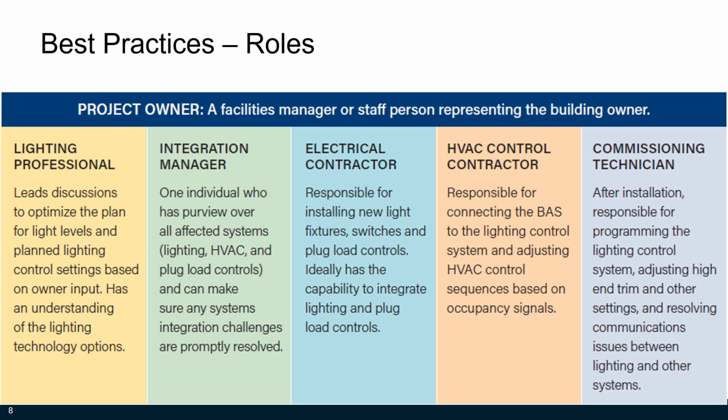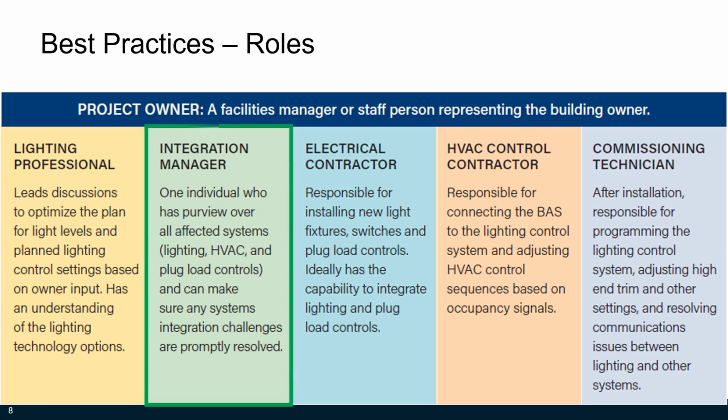This figure describes team members' roles that are necessary for successful implementation. One individual, like the electrical contractor, may cover multiple roles. The integration manager role is critical and should not be overlooked. Successful integration of different building systems will entail some challenges, and someone will need to be accountable for problem solving and team coordination. The integration manager could be capable of performing the programming tasks necessary to tie systems together, but regardless needs to oversee and coordinate the programming work done by other members of the team.